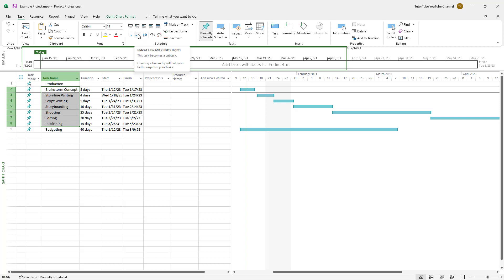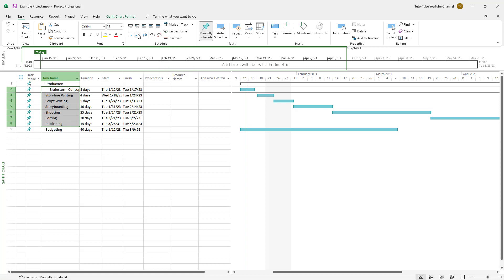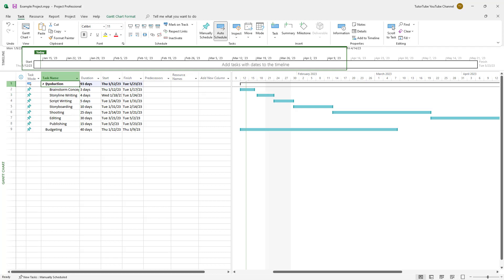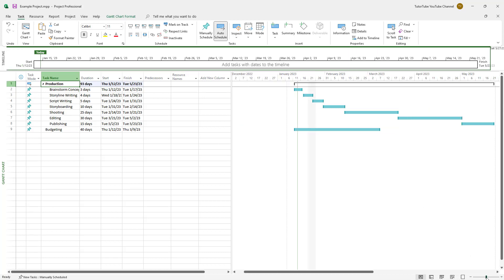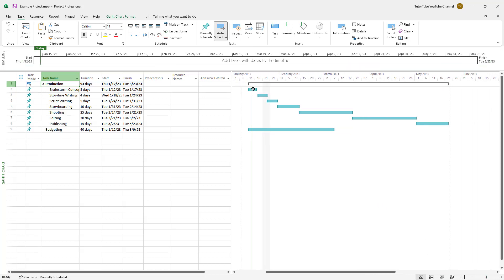From the Task tab, you can see the 'Indent Task' option. Clicking it makes all of those tasks part of the Production task. If I zoom out, you can see the Production task spanning from beginning to end.